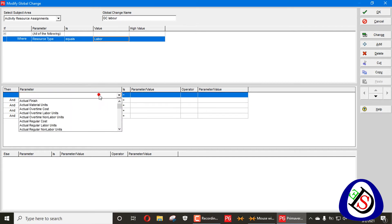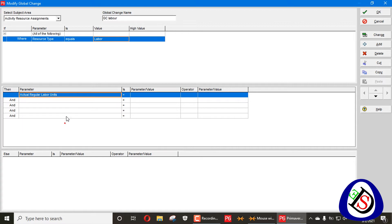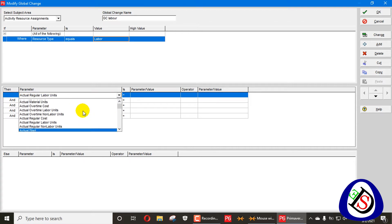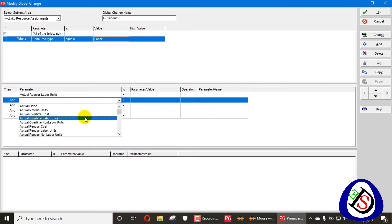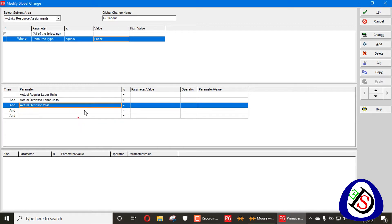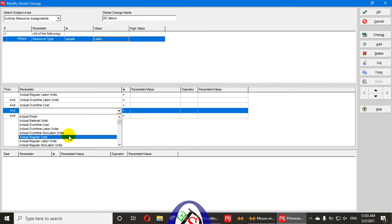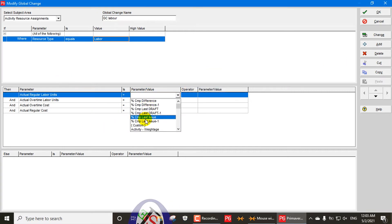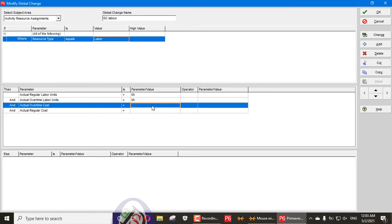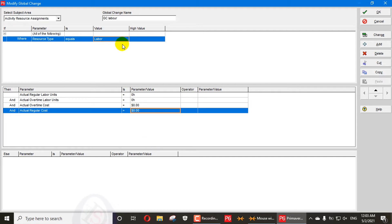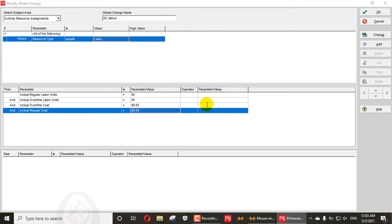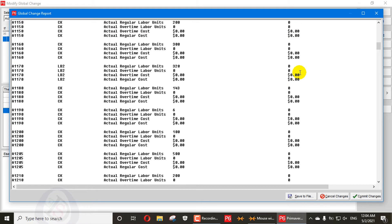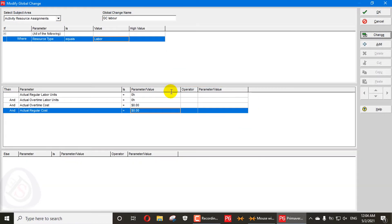Add a minimum of five parameter columns. In the parameters, write: Actual Labor Units, Actual Labor Units again, Overtime Cost, and Regular Cost. Set the custom value for each of these to zero. When you go to Change, you can see the old values — for example 5000 — changing to the new value of zero. All labor units cost and overtime cost are changed. Commit the changes and press OK.